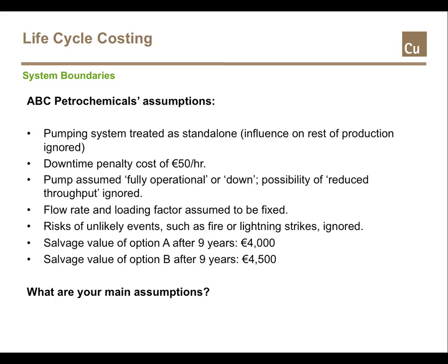He will consider this pumping system a separate unit. He'll acknowledge a fixed penalty cost of €50 per hour of downtime, which represents the cost of providing a backup solution, but will not consider the pump's influence on other parts of the production process. Second, he will only recognize 2 states, a fully operational pump or a fully down one. A running pump with reduced throughput is not a possibility Leonard is taking into account.